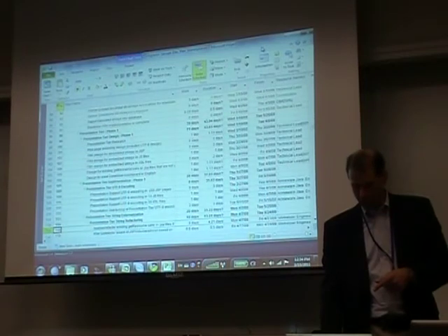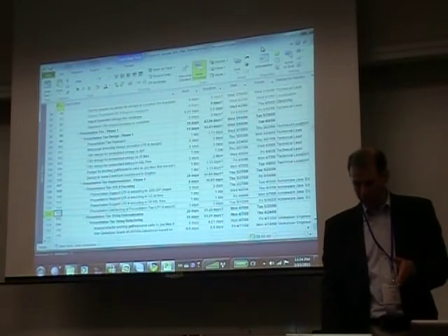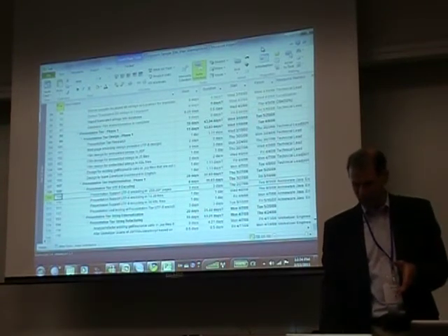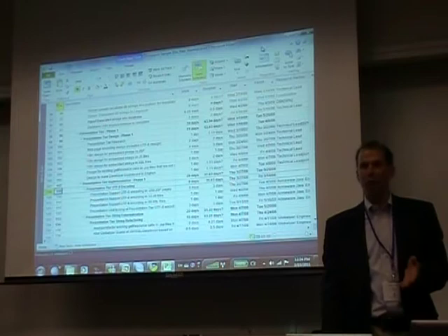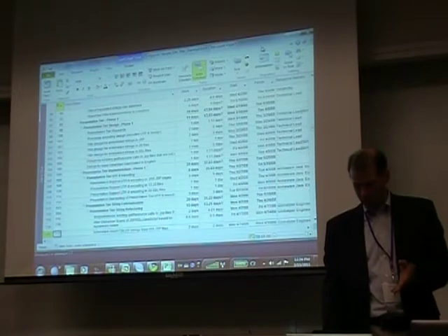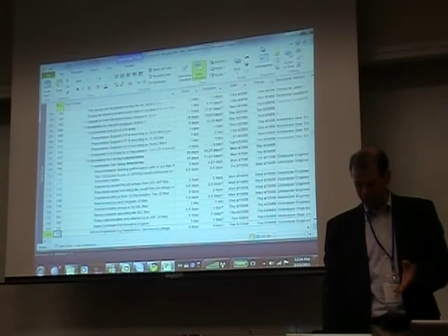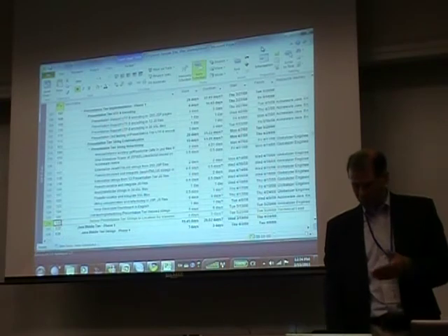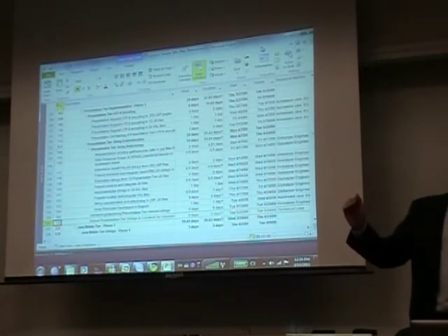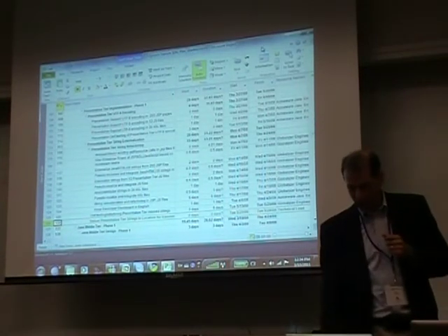And you can see here in the presentation, we're dealing with encoding, making sure that that encoding is done. Fortunately, these are JSP pages. You can see that's not actually a huge task. We only have a few days involved in that. The encoding task was a total of 8 days, pretty good in the world of programming. Then we go into string refactoring. We're externalizing strings, and again, we're delivering these presentation strings so that they can be localized so that we can then reincorporate.